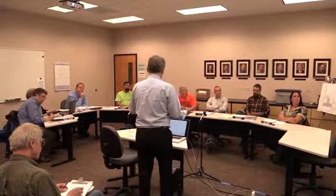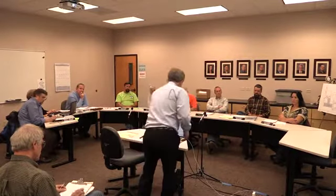On time, there's the simultaneity. I had a B right in here, but I think I'll have to go talk to the dictionary about that. Simultaneity is foundation, site work, and site utilities happening at the same time that the factory is building the classrooms. And in the factory, Tom was there, we were at a plant, Blazer down in Omsville, and they've got 100 classrooms to build before the middle of August so they can get installed. 100 classrooms, that's a lot. Things go faster in a plant because of repetitive factory construction, where you lay out walls, and maybe a lot of walls are the same, so that repetition really speeds things up.